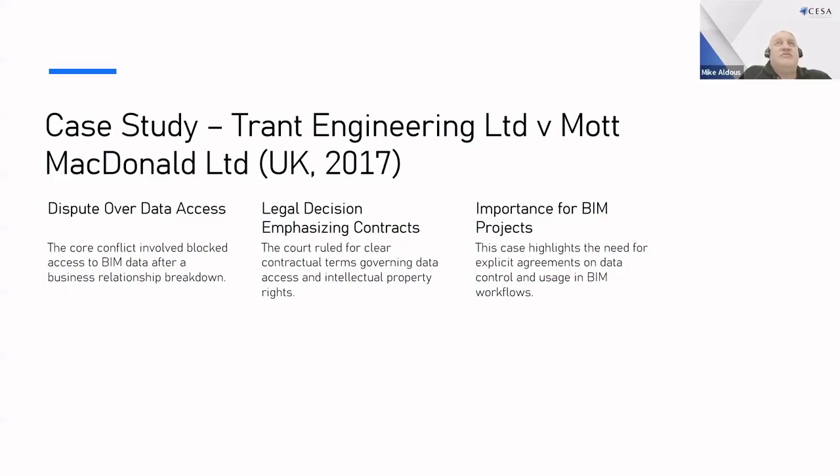Trent Engineering had failed to pay Mott MacDonald for various services. Mott MacDonald in turn turned off their access to the common data environment and basically locked them out of the system. Therefore, they were unable to deliver on their deliverables because they no longer had access to the data environment, and in turn incurred additional costs because they were not able to meet their contractual obligations.